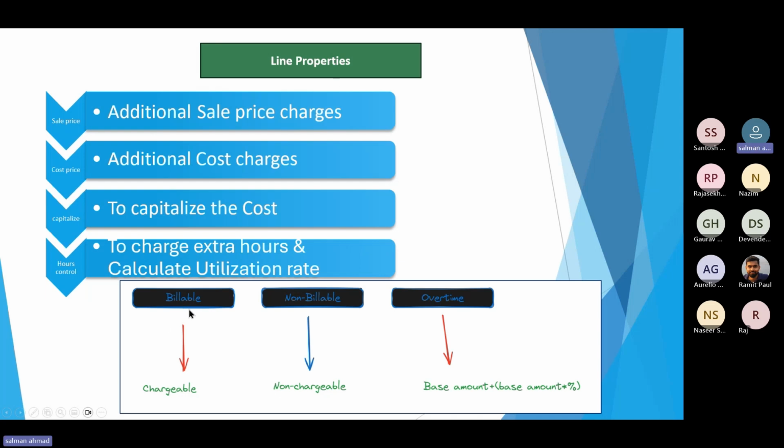So this is the same example. Let's say we have three transactions that imply posting regarding the hour transaction. First will be billable, that will be the chargeable activity. And the other one, if it is something that we are internally just recording the cost, that is not chargeable to the customer, in that case the activity will remain non-billable. If it is a fixed price project, by default, even if we post it as billable, the system will keep it non-billable, because in fixed price we bill for the contract based fixed amount.